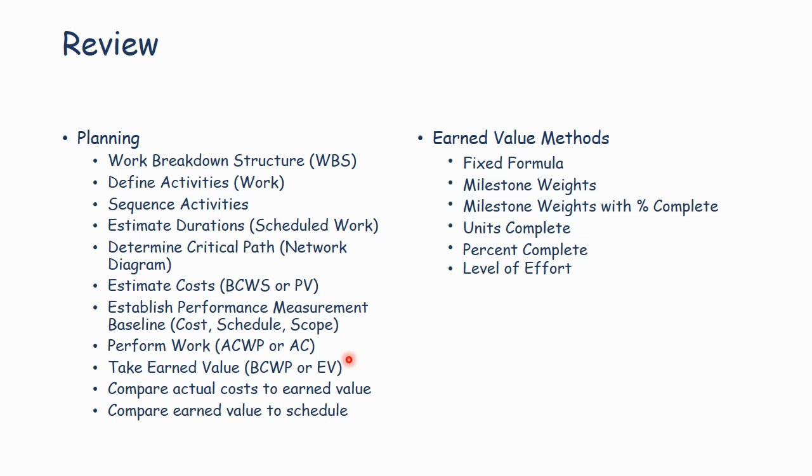This is where actual cost of work scheduled occurs, or actual cost. And then when you do that, you take earned value. So when you accomplish tasks, when you perform work, you take earned value and you create a budgeted cost of work performed, or earned value.